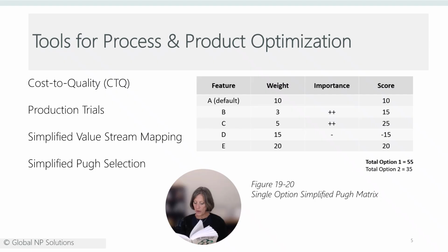During the Lean New Product Development workshop, team members and subject matter experts rank the various alternatives as compared to a default baseline alternative. It is important to designate one of the alternatives as default to assist comparison. The default may be an existing design or the baseline processing steps considered to be lowest risk. Alternatives should always include a lower cost option and a higher quality selection.